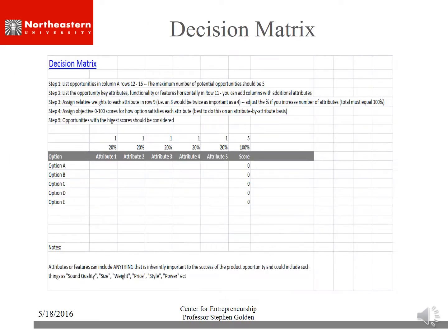The next page is a decision matrix. How did you get to where you are? What was the path that you took to end up with the ultimate project that you're working on? This happens to be a Pugh decision matrix. It's a weighted matrix that helps you quantify individual projects, which ultimately should help you pick the most promising project.